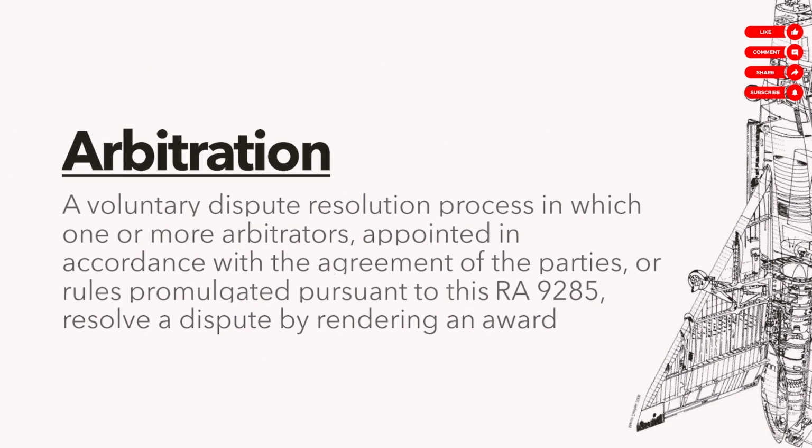Let's just quickly also define some of these terms kasi madalas din na ma-mention. Arbitration is a voluntary dispute resolution process in which one or more arbitrators appointed in accordance with the agreement of the parties resolve a dispute by rendering an award. Ito dalawang nag-aaway. Okay? Pag sinabing mag-arbitration sila, ibig sabihin, hindi sila magsasampahan ng kaso sa korte.